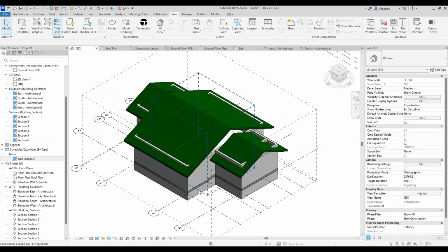Okay. That is why in Ghana here, we will do a project and say that the project will cost 30 million. And when we start the construction, we will do variation. By the time we are done with the project, the project is costing about 120 million Ghana cedi. Meanwhile, when we did the initial estimate, we said that it was what? 30 million Ghana cedis. Who pays for that extra 90 million Ghana cedis? And that is the very reason why most projects in Ghana always do not get what? Completed. And we get to a certain point, then we chop all the money because we don't do the right thing.